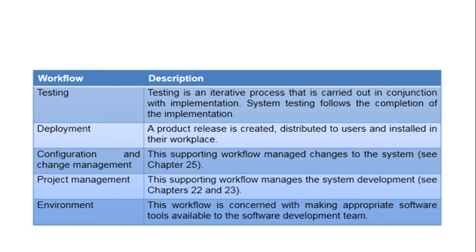Now someone made a change to this document, and it is a minor change. The next version is version 1.1. Again someone got the change which is a major change, we'll name it as version 2.0. So maintaining these changes, that means these changes are carried out in a smooth way and it's updated, right? This is configuration and change management.